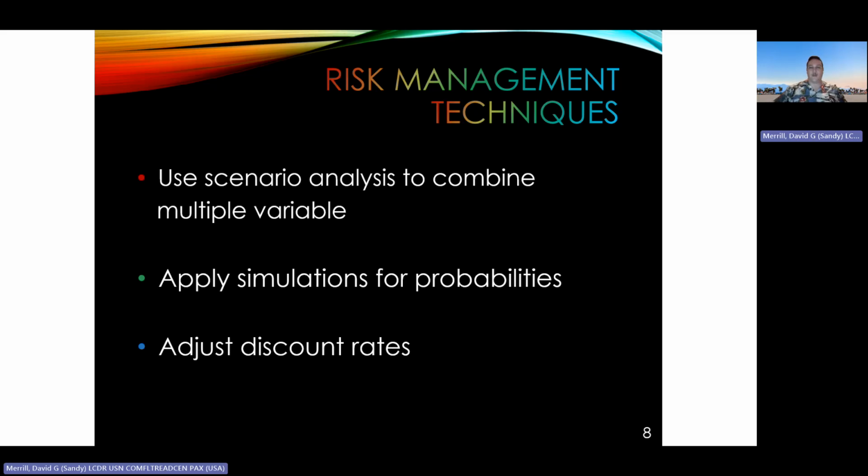Let's walk through an example. The company considers launching a new product. By flexing sales forecasts and interest rates, management identifies the breaking points where NPV turns negative. These results are informative not just for go/no-go criteria, but also allow for contingency planning.